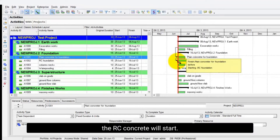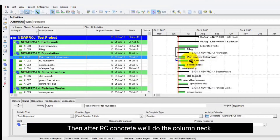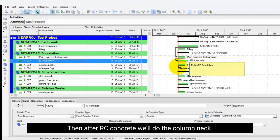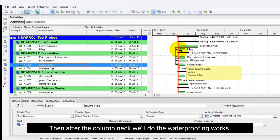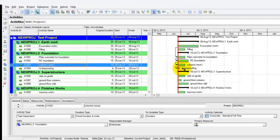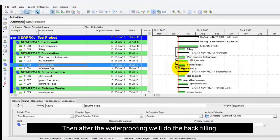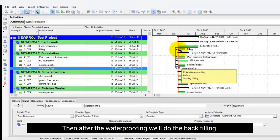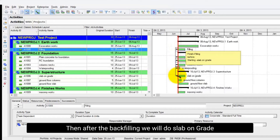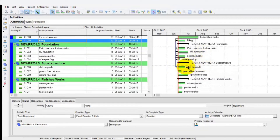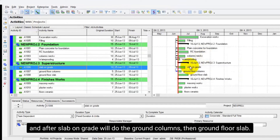Then when the plain concrete finishes, the RC concrete will start. Then after RC concrete we will do the column neck. Then after the column neck we'll do the waterproofing works. Then after the waterproofing we'll do the back filling. Then after the back filling we will do slab on grade. And after slab on grade we'll do the ground columns, then the ground floor slab.